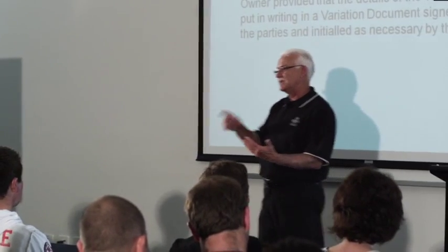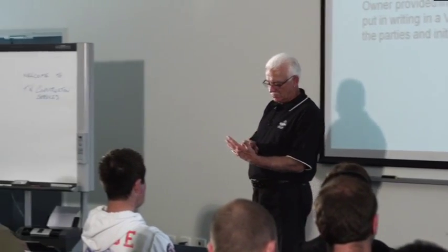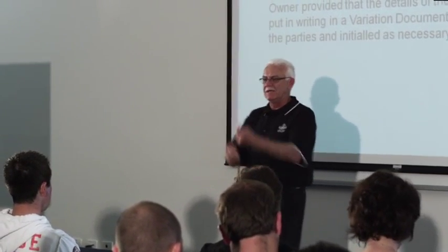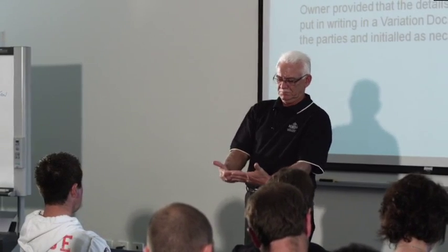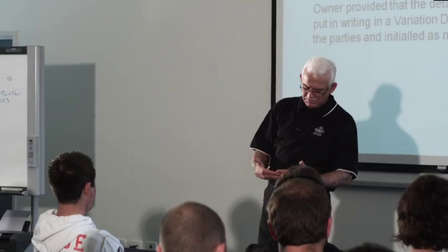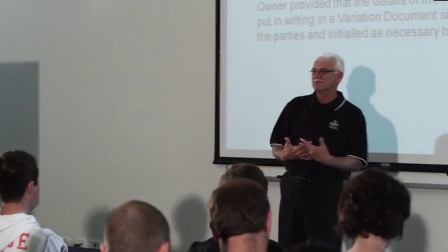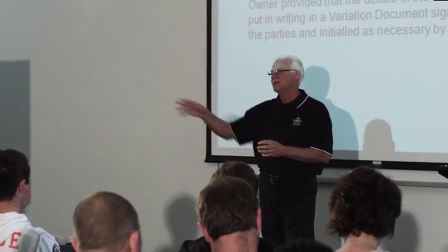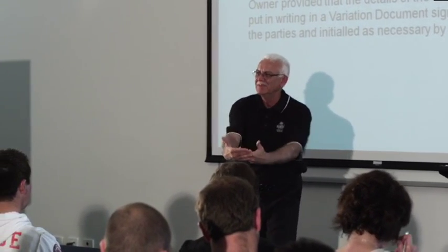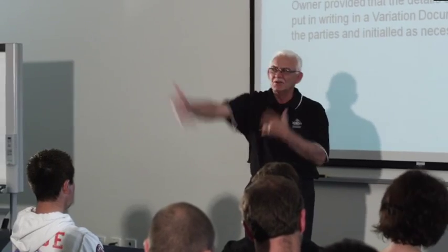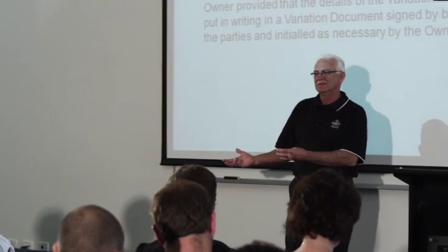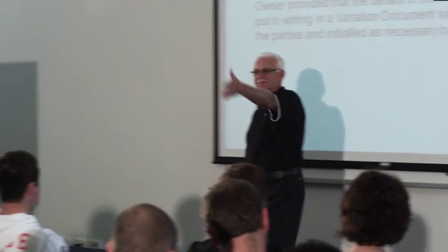It's going to take me an extension of time of so many weeks, so we're going to extend the contract, time extension claim, and it's going to cost you $3,500. Here, sign that. Oh, $3,500? Oh, geez. Yeah, well, look, I didn't really think it was going to cost that much. No, you better leave it where it is. All right, so you've actually proven to them that you might have done all that work and then found out that they couldn't afford it anyway. Right? Questions?